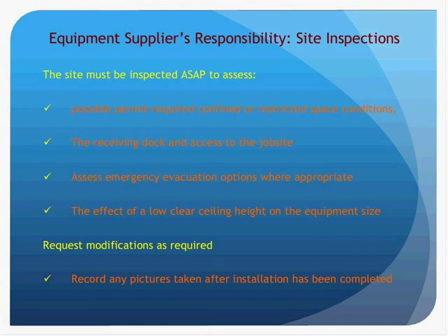The selected equipment supplier should keep the end user informed if, and document when, any equipment listed in their proposal is no longer available, will be late, or if a component must be substituted in place of one that is defined in the proposal. In addition, a site inspection can detail what OSHA requires or has defined as a permit-required confined space or a restricted space condition.